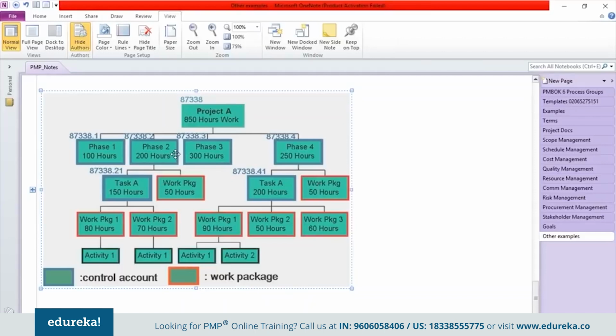Depending on what approach you have decided, you can use that high level template and create the work breakdown structure. As you can see in this structure, you have broken down your phases into various work packages, and those work packages are broken down into activities. If requirement is the phase you're working on, requirement gathering could be one of the activities, and what you will work on as a work package could be to create the requirement specification document. Activities could further be broken into various tasks as well.